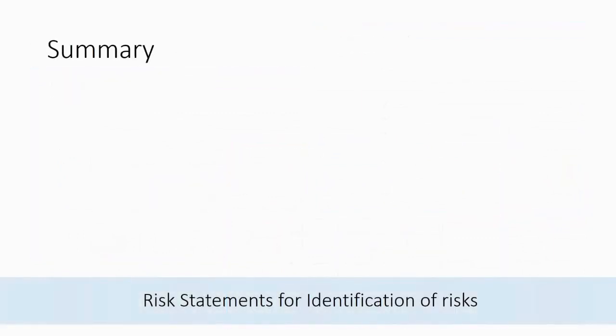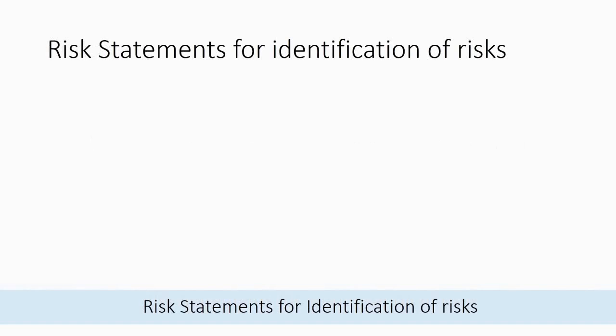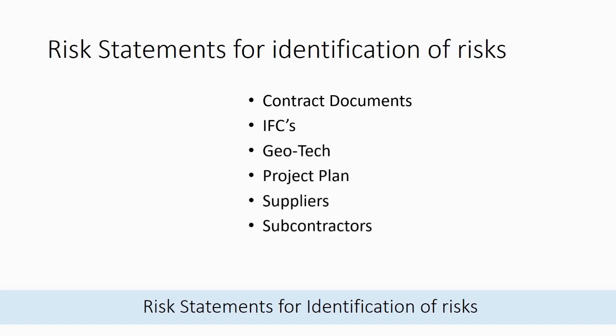In summary, risk statements are a useful tool for the identification and analysis of project risk. To identify risk, review the contract documents, IFCs, GeoTech, especially the project plan, suppliers, subcontractors, equipment availability, and of course the lessons learned.